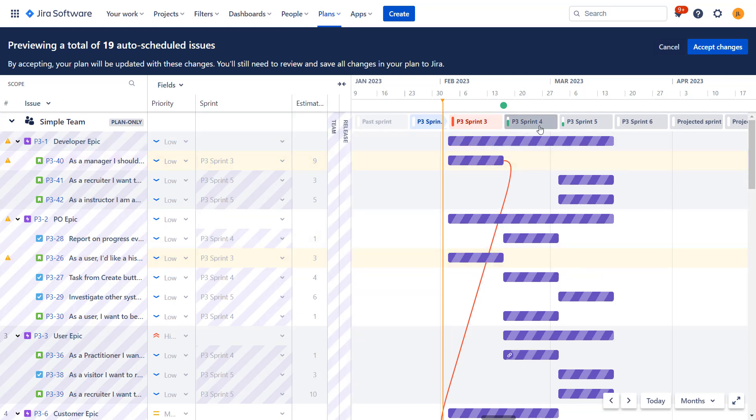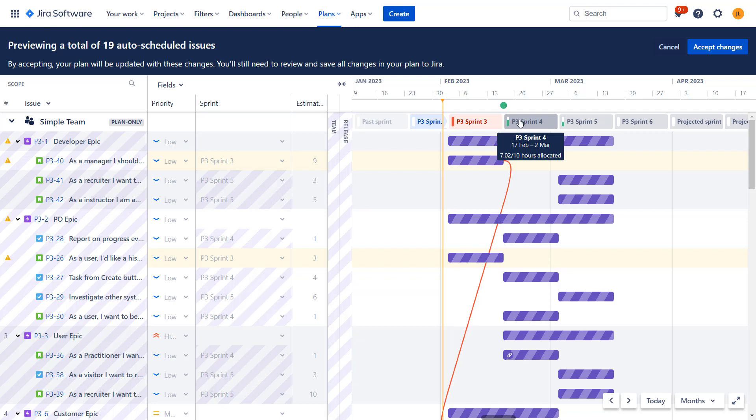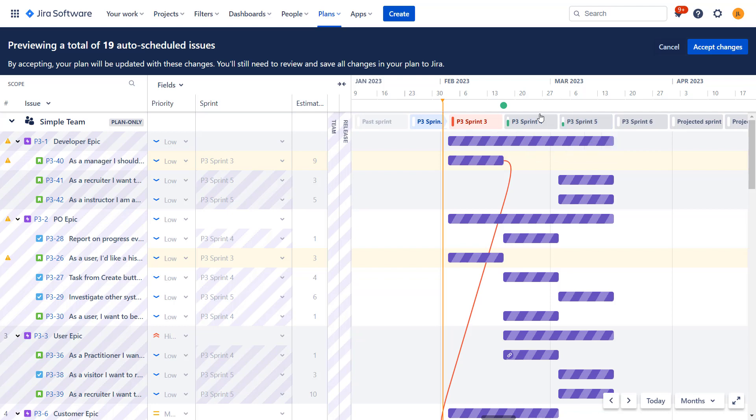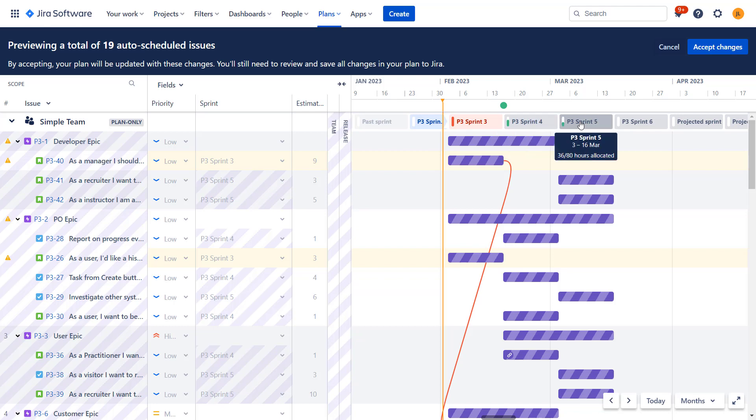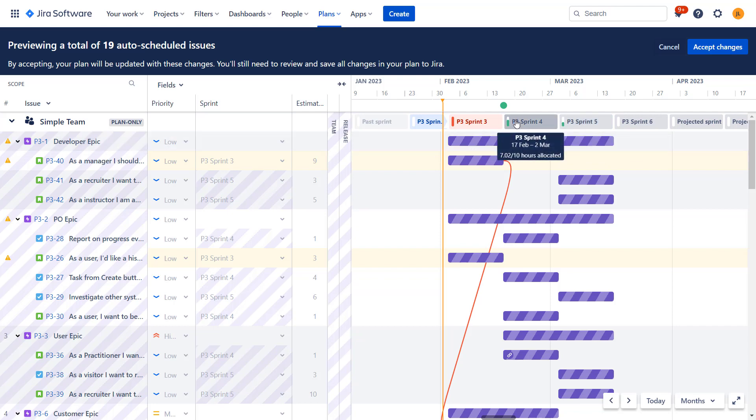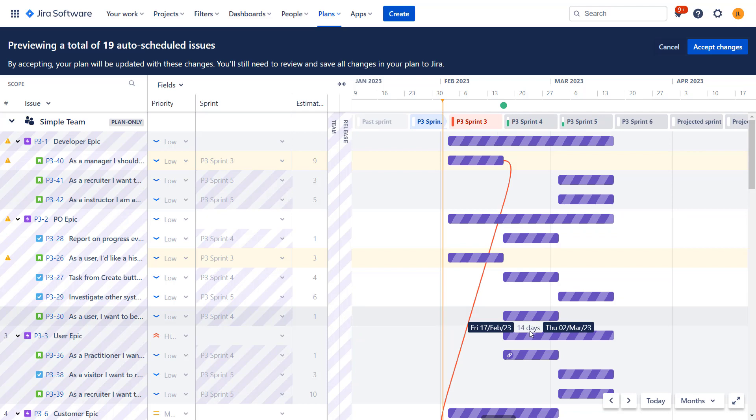But on the other hand, there appeared a lot of tasks in the next sprint. So you can see that in sprint four, we have 7.02 hours out of 10 and in sprint five 36 out of eight. You can see that despite the fact that we have some room here, auto schedule already put something into sprint five. This could be due to the reason that maybe there were no more tasks that were like three hours or less. So we would get into red over here.